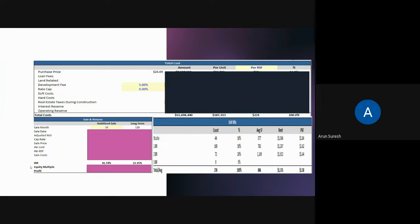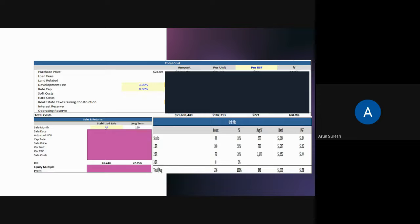As you can see, the budget we established was around $187,000 and the rents we could charge were $1,335. Based on this, we had to see what the returns were on a short stabilized sale and on a long-term sale. A stabilized sale is once the property is 95% occupied or rented out. A long-term hold means making cash flow from your investment rather than selling immediately. The goal was 14% IRR, but we hit 22.35%, which made it a very attractive opportunity for the company.